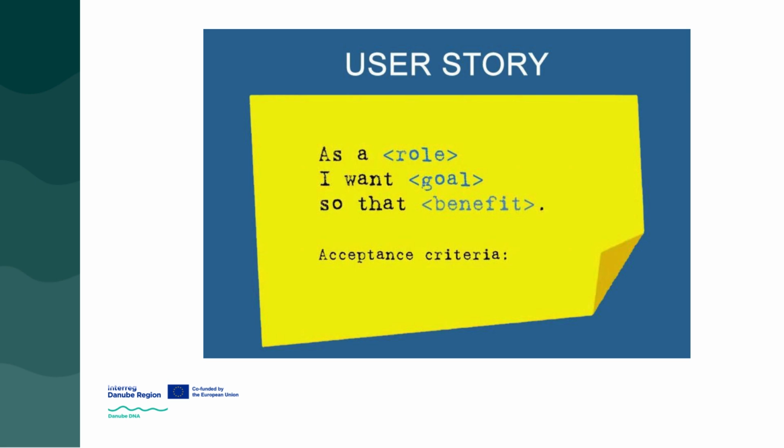A user story follows a specific sentence template, where the structure of the sentence helps us define who is involved, from whose perspective the story is being told, what the goal is, and what direct benefit the user will receive when that goal is achieved. In English, the word order of sentences follows a different structure, which makes it easy to substitute the elements within the user story template. By following this structure, we can insert the actor, define the goal, and specify the result or the positive outcome that the actor will gain if the goal is successfully achieved.